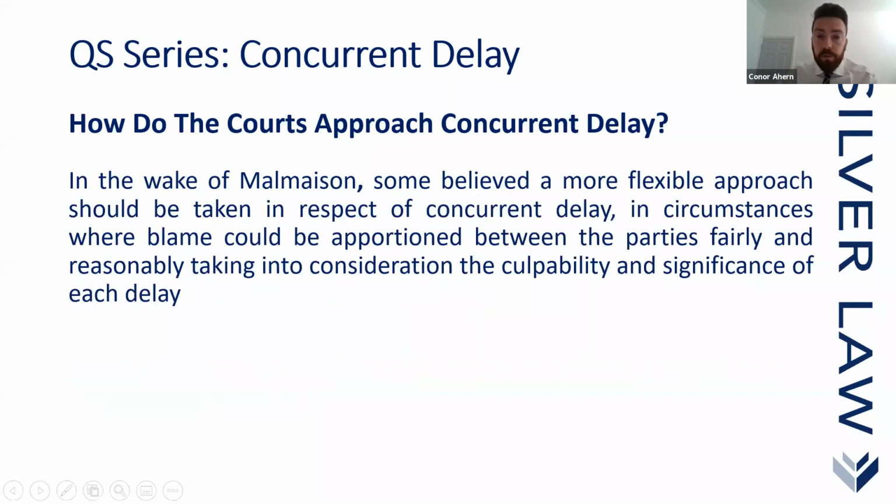Okay, so in the wake of Malmaison, some believe that a more flexible approach should be taken in respect of concurrent delay in circumstances where blame could be apportioned between the parties fairly and reasonably, taking into consideration the culpability and significance of each delay. This is the point about apportionment that the Scottish courts dealt with in the case of City Inn versus Shepherd.